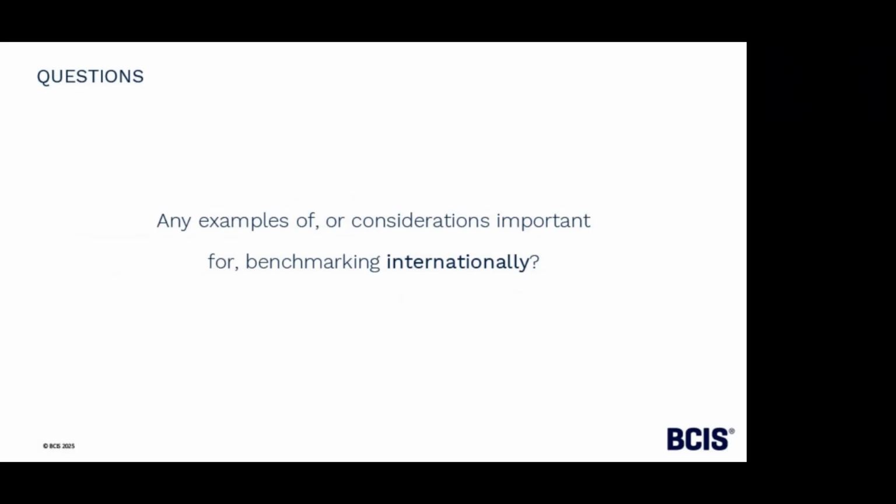Those factors have been built up from first principles. So we've done comparisons of labour, materials, and plant at local level versus the UK. We've looked at productivity. We've looked at import duties. We looked at local taxes, and productivity, etc. That all to try and come up with a flavour for how a cost can differ between one location over another.